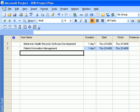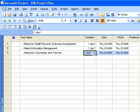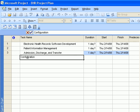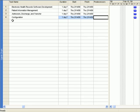So let's go ahead and enter the first task listed, which is admission, discharge, and transfer. Click on tab and it brings you to the duration. This task has two parts. It has the configuration and it has the training. The order is that you have to configure the system first before you start training. So what we'll do is use that task as a heading. And then under that, we'll put in configuration and then training.